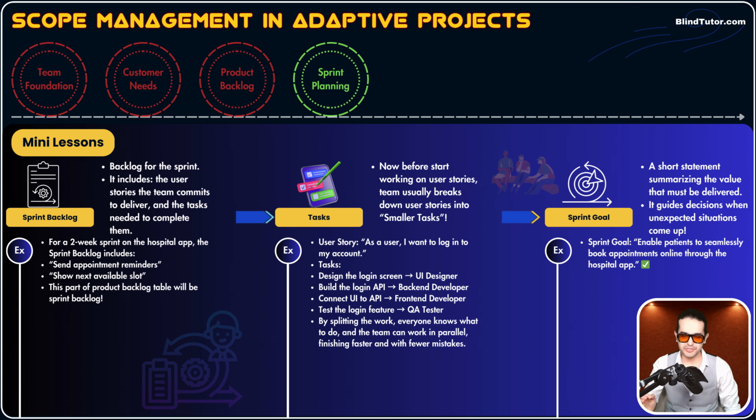Okay, beautiful, I guess, very beautiful. And guys, how does a sprint goal help a development team? For example, mid-sprint, a stakeholder requests something, or one team member wants to do something in that sprint that hasn't been planned. Now, the development team will hold a meeting and ask if those requested things, or that team member's recommendation, are aligned with the sprint goal or have nothing to do with it. If it has nothing to do with the sprint goal, we say shut up and go. No, we don't say shut up. We say, the sprint goal is different. This suggestion is good, but not for now. Okay? This is how we use a sprint goal.